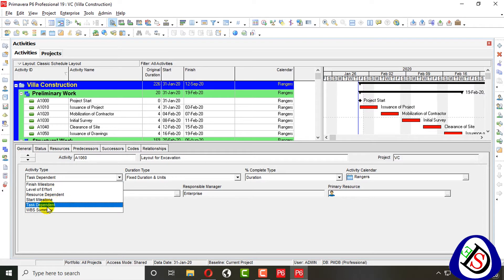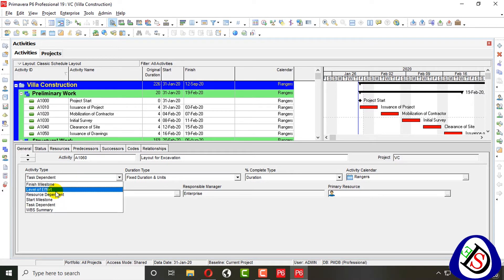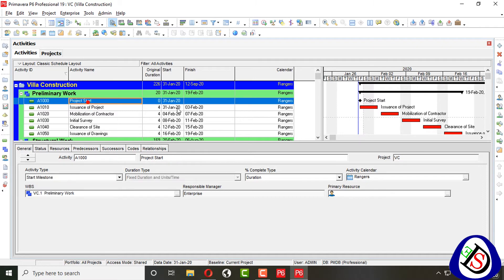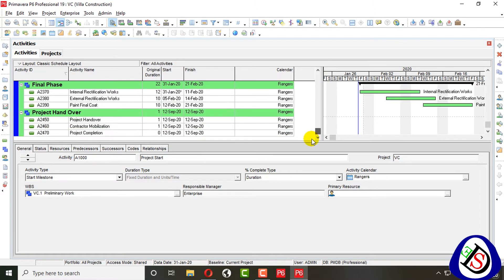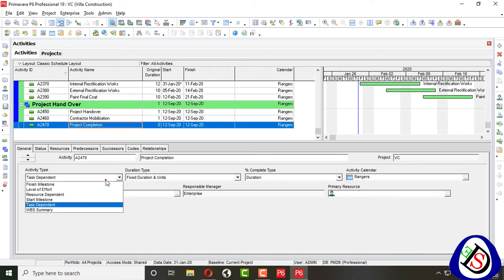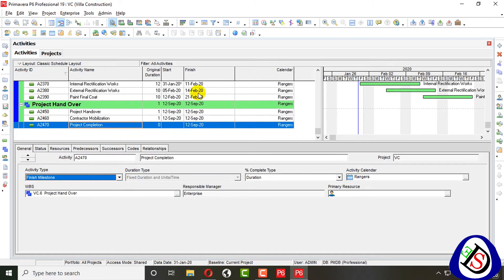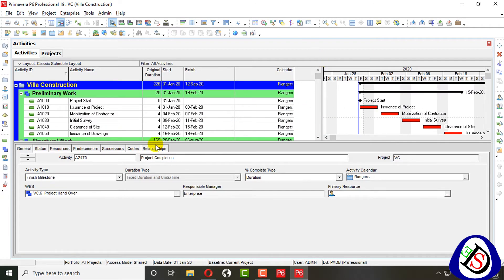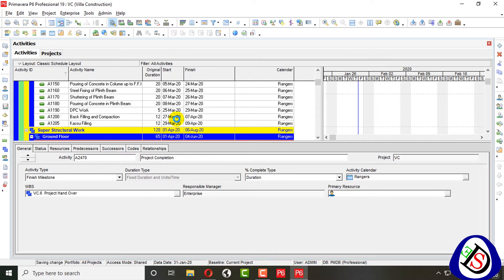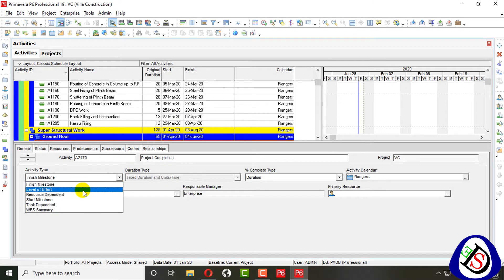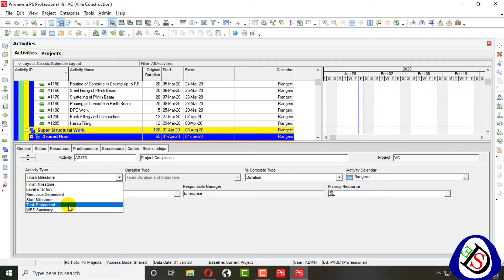Task Dependent activities are generally used with relationships assigned, and they mostly run on the critical path. We also have the Start Milestone, which has only a start date assigned, and the Finish Milestone, which has only a finish date. I created a finish milestone — you can see the date is removed and the finish milestone appears. So three activity types are done: Finish Milestone, Start Milestone, and Task Dependent.